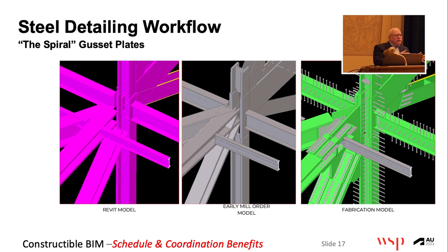But if you don't want it, tell us how much it'll cost for you to generate your own technical model and make your own shop drawings and not use our engineer's model. So I was happy he did that because my fee was $2.5 million and their price came in at $5 million. So I knew what to charge on the next one. And that's without the extras for the RFIs.